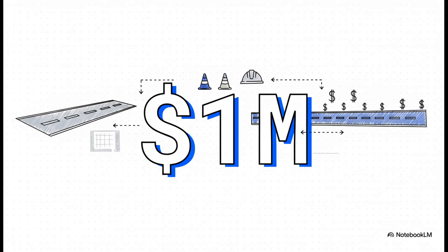A classic example? Road construction. If your data shows it costs, say, $1 million to build 1 kilometer of road, you can pretty confidently estimate that a new 5-kilometer stretch of road will cost you $5 million. See, it's more accurate because it's based on a real, quantifiable metric.